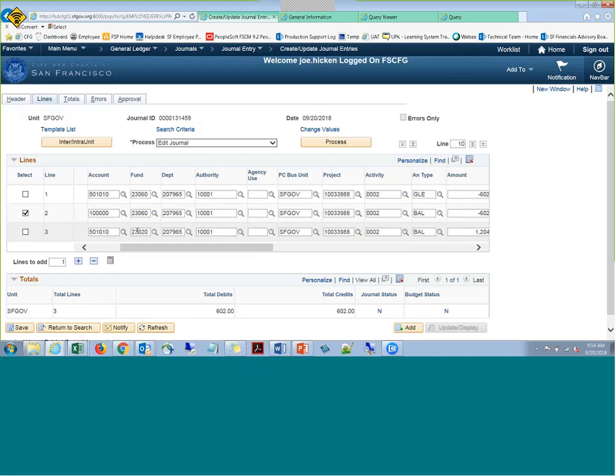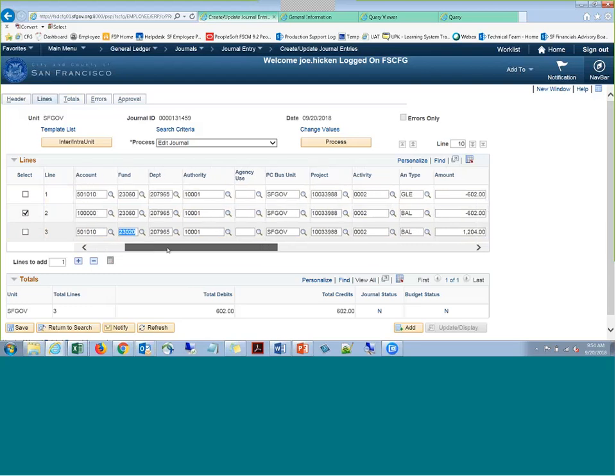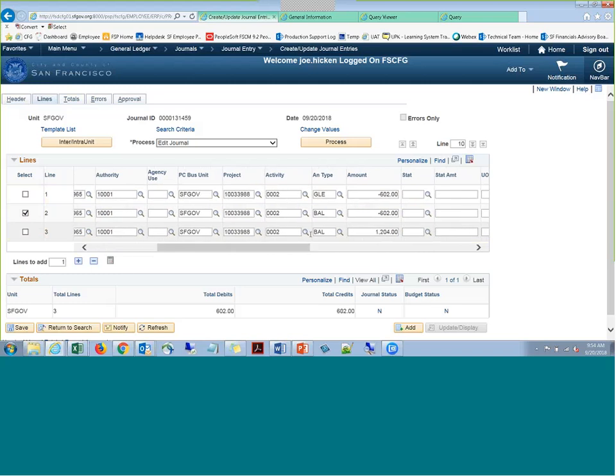So this is a grant fund that we want to make sure the abatement is hitting. Just to recap, these were the unallocated fund. This is the federal fund. If I use the unallocated fund here, it's not going to trigger billing. I'm not going to illustrate that. Make sure that the analysis type is an eligible trigger analysis type. It's not a balance sheet item. I'm abating this to 2 activities.